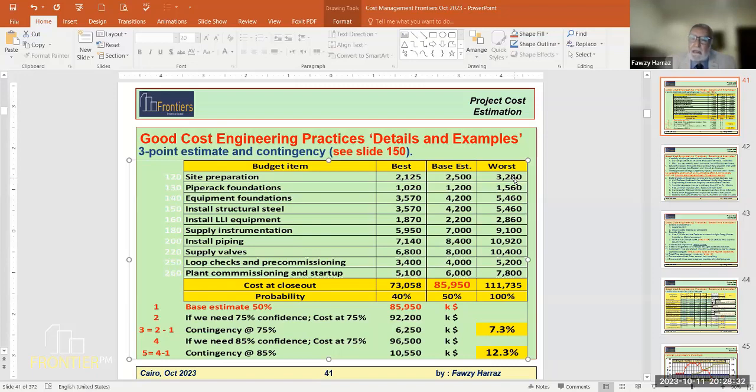We normally, as a contractor, have the room to call for variations. We qualify our tender price. We say this item costs 50 million based on this quantity and these specifications. Later on, if the detailed engineering says the quantity, say 50,000 cubic meters of concrete, is now 60,000, we have to adjust for the quantities.